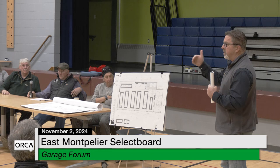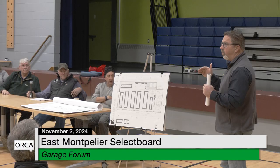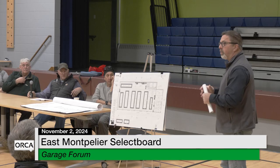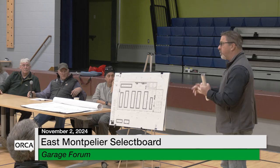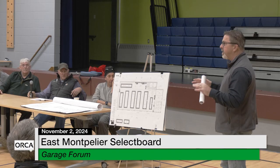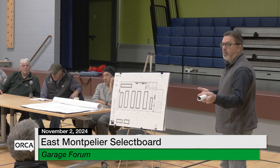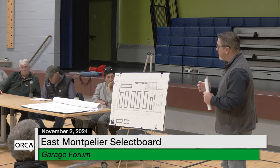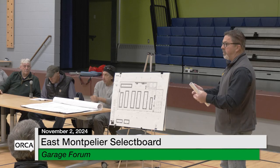As we move forward in the design, through design development and construction documents, we will reduce that contingency as we learn more about how we're going to approach things. You're going to learn more about the septic system, the underground soils, how we deal with stormwater, other things that aren't clear at this moment. And we have to know how many wells we have to do, because we have to do thermal conductivity tests, because that'll determine how well the surrounding ground transfers heat to the well.